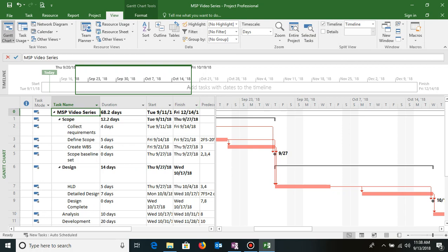I would like that every Friday there would be a meeting in my project with my team. So rather than creating tasks for 3 months, which means around 12 weeks, instead of creating 12 tasks, I can create one recurring task and set it to recur every week. So how do I do it? Recurring tasks are recommended since it will start from the beginning of the project itself. So I would create it at the top